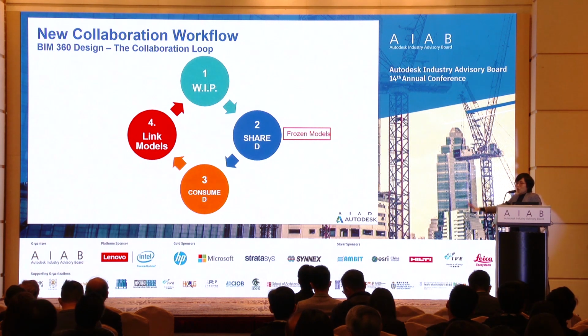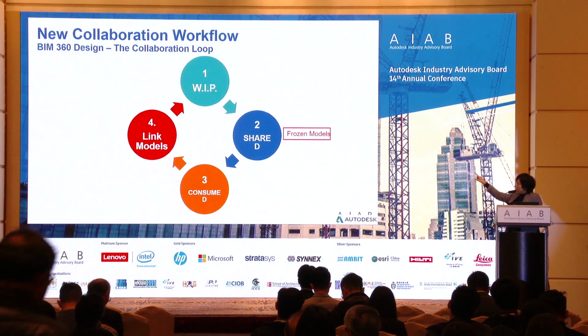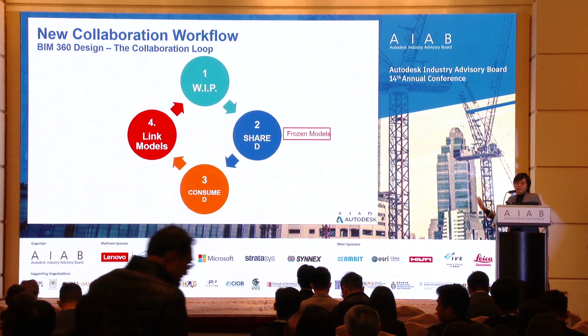And then the third one is consume. The structural engineers receive an email that I have published something. Then they have to review my model, whether it is okay for them to further develop. If they do not agree with my work, they don't need to consume the folder, just keep it. So in this process, there is no copy and paste.